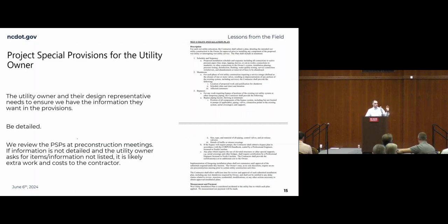We're trying to review these usually during pre-construction meetings, giving the municipalities and everyone an opportunity to discuss any expectations, anything that's specific in there. But a lot of times, we'll hear during those conferences, the municipality may speak up, oh, well, yes, we realize this isn't in the contract, or this isn't in the details, but if you go to our website or go somewhere else, it states it on there. But if we're not linking to that information, a lot of times we get to this impasse.